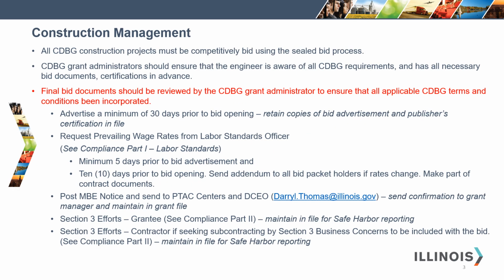Thank you. All CDBG construction projects must be competitively bid using the sealed bid process. CDBG grant administrators should ensure that the engineer is aware of all CDBG requirements and has all necessary bid documents and certifications in advance. Final bid documents should be reviewed by the CDBG grant administrator to ensure that all applicable CDBG terms and conditions have been incorporated.